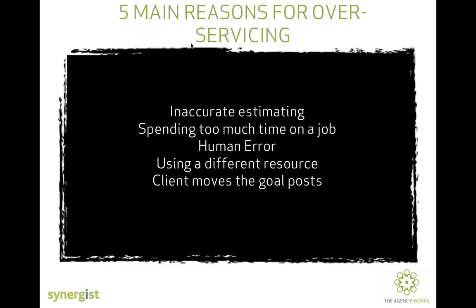And finally, client moves the goalposts. This is what I said about the amendments. It may be that the client changes the brief, in which case we would always recommend you go back to that estimate and actually change the estimate. Then, whether or not you're charging for that, possibly send an extra quote out.